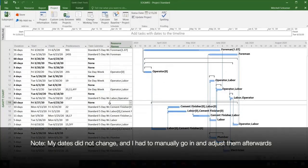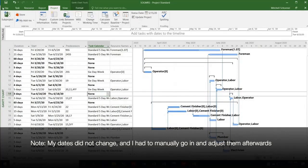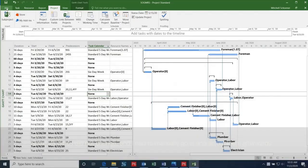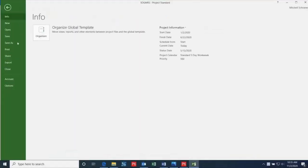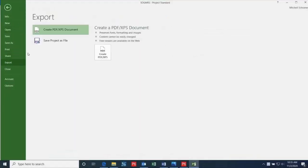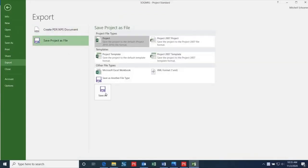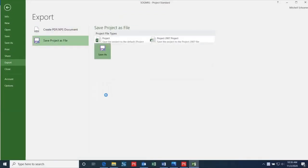Now that we have the schedule showing the correct dates in Microsoft Project, I'll show you how you can export this file into P6. The first step is to click File, then Export, then Save Project as File, and then select XML Format, and then click Save As.